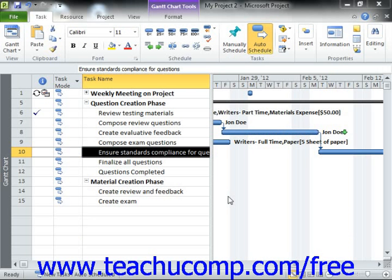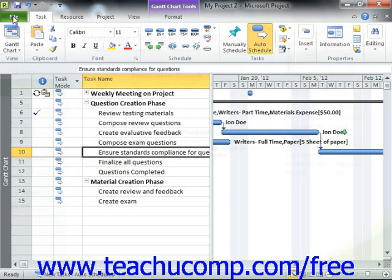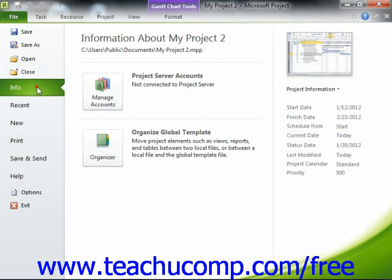The Organizer within Microsoft Project allows you to transfer views and other defined objects between opened project files. To do this, first open the project files between which you want to transfer the custom project file objects. Then click the File tab within the ribbon and select the Info command from the choices shown at the left side of the backstage view.